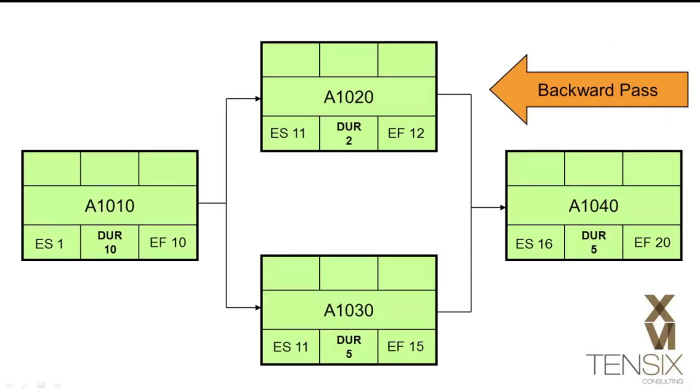Next, we perform a backward pass. This will calculate the latest dates that activities can start and finish before they impact their successors. Starting this time with activity A1040, we know that the late finish date will be day 20. We then subtract the five-day duration, and then add one to get the late start date of day 16.